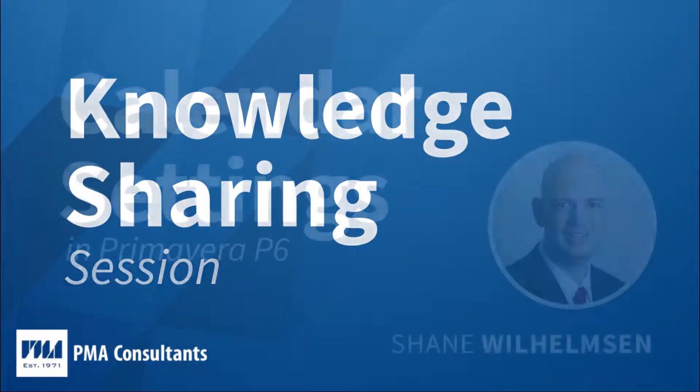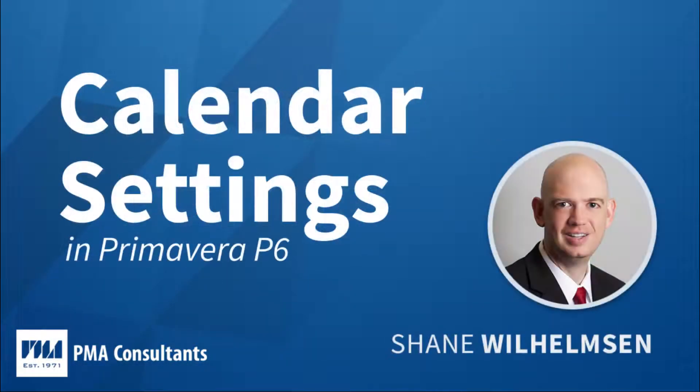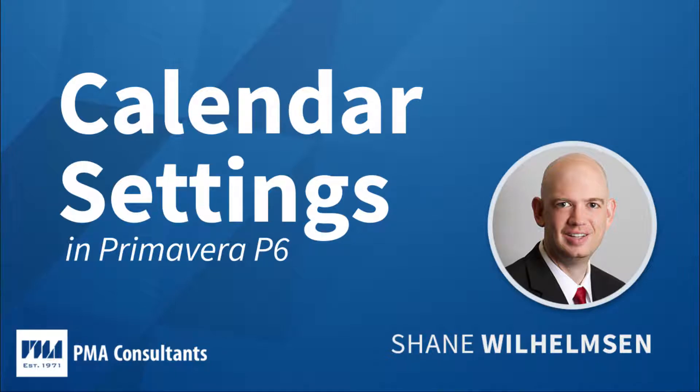Calendar settings are one of the foundations of any project schedule. An activity's calendar settings determine which days are workdays versus non-workdays. We're going to take a brief look at the differences between global and project-level calendars.